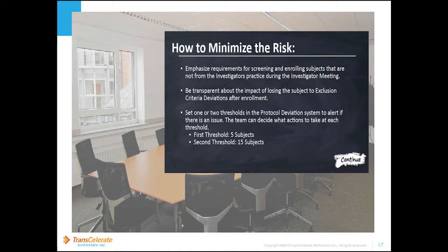The clinical trial manager suggests to emphasise the requirements for screening and enrolling subjects that are not from the investigator's practice during the investigator meeting, and being transparent about the impact of losing the subject to exclusion criteria deviations after enrolment. The data manager suggests that the team could set 1 or 2 thresholds in the protocol deviation system to alert if there is an issue.